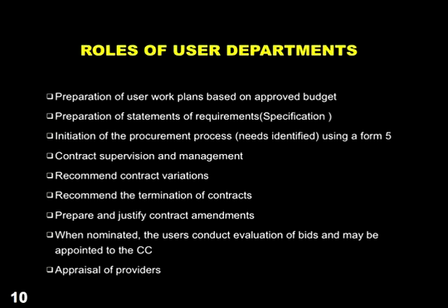The other role is that it is you who initiates the need. And this need, you initiate it using a Form 5. I think most of you are familiar with the Form 5. Before the amendments were made, it was Form 20. But now it's Form 5. So it is your responsibility as a user department to fill that Form 5, then you take it to your head of department, then the accounting officer at the college signs it. So it is your role as a user department to initiate the Form 5.